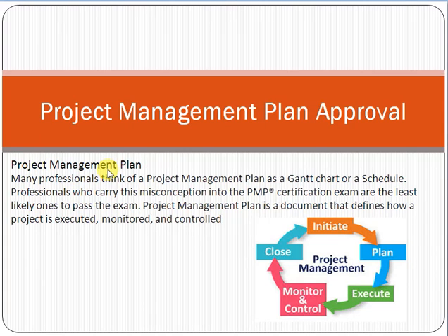Let me tell you, friend, that if you go into the PMP exam with this concept, I'm 100% sure that you cannot pass the exam, because as per the PMBOK, the Project Management Body of Knowledge, a project management plan is a document that defines how a project is executed, monitored and controlled. So a project management plan is not a Gantt chart or just a simple schedule. It's a document which explains how you will initiate, how you will execute, and how you will manage the monitoring and controlling. It defines the overall things. Just remember that it's a document that defines how a project is executed, monitored and controlled.